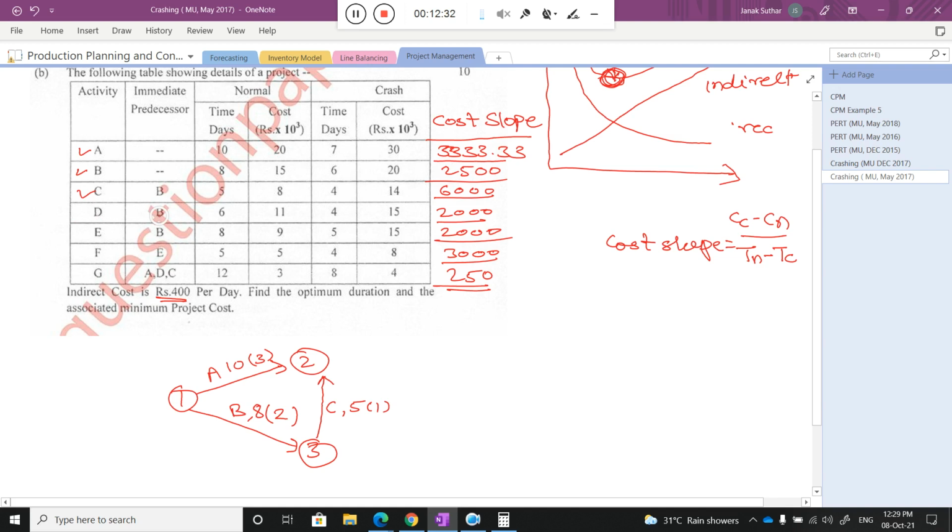the B is the, you can say, the precedence relationship, meaning I can start activity D at point 3, but activity D also plays as a precedence. I cannot match 3 to 2, meaning for activity C and D the start and end point is not the same. So that's why I draw it differently here, just try to understand.